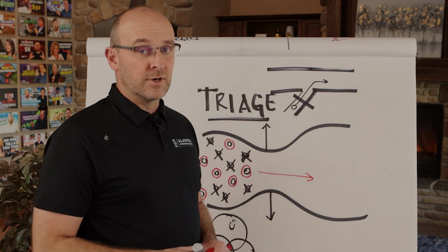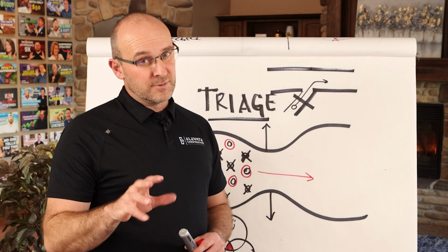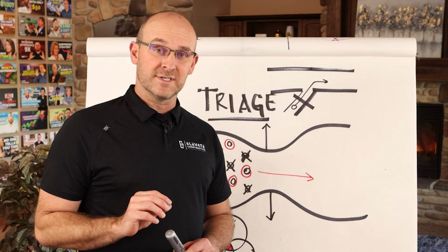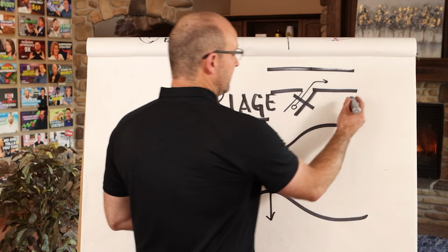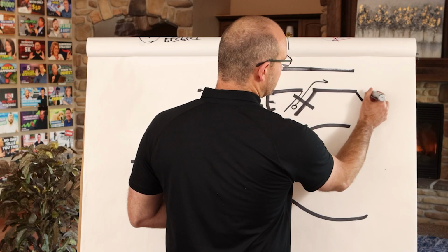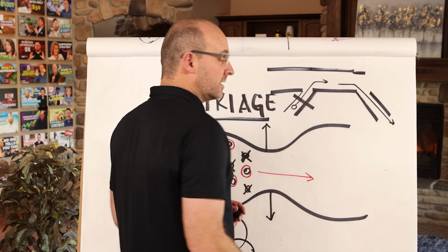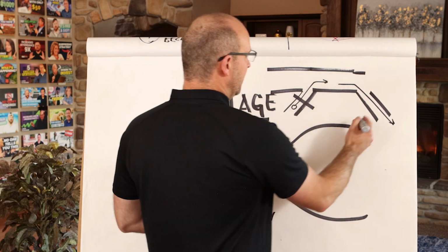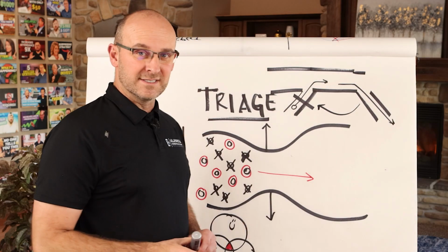Number two, you can do a one in, one out policy. That would work 100% for a construction company that has projects. Not so much for the phases. It would work with crews and tasks, and it would work with manufacturing, where literally the policy is, as soon as we're done with one, like let's say the product is done or we're finished with the client, then that releases the gate to allow something new into the system.